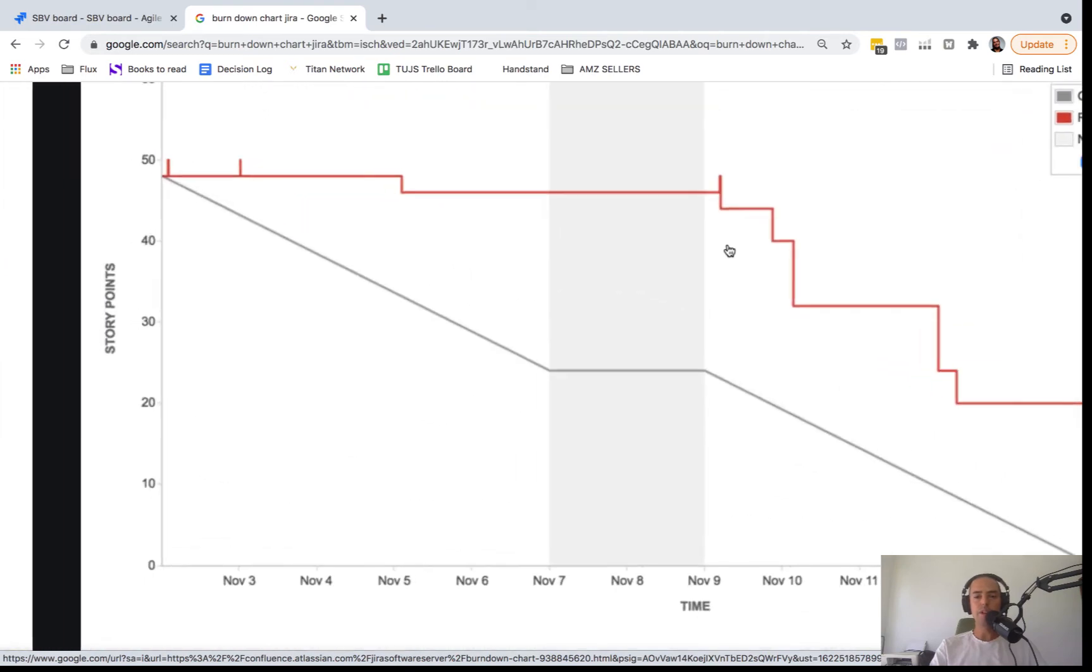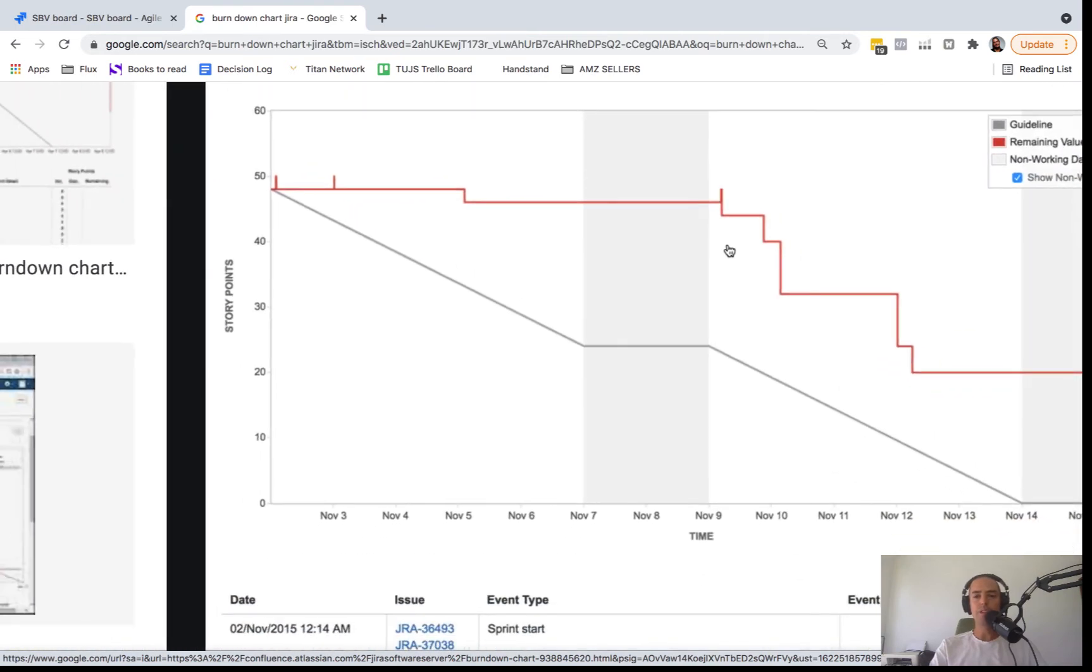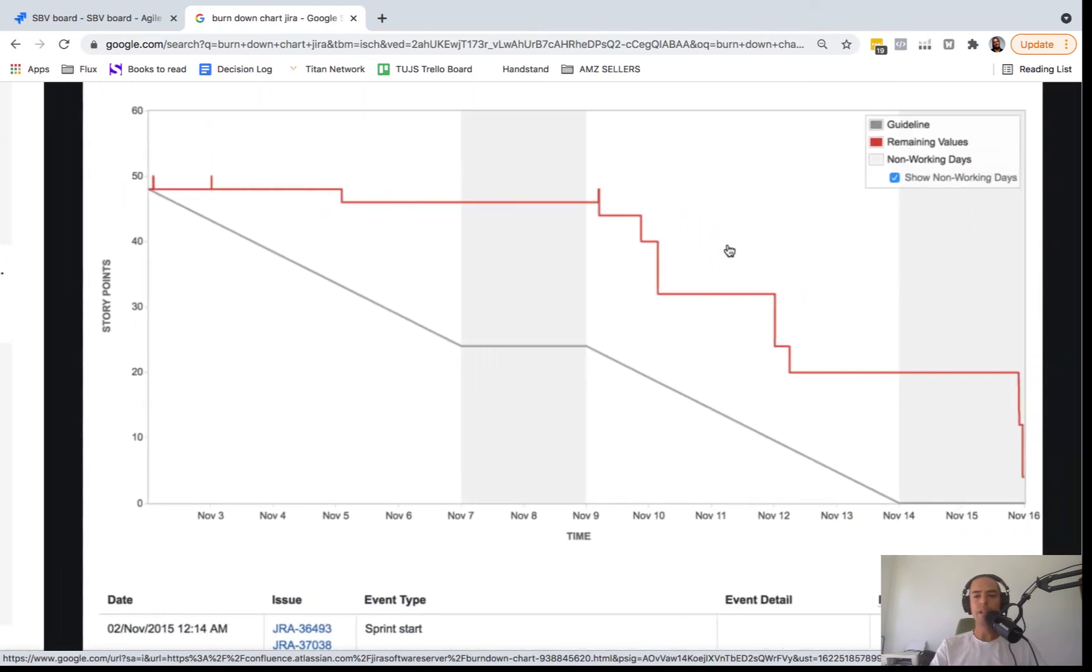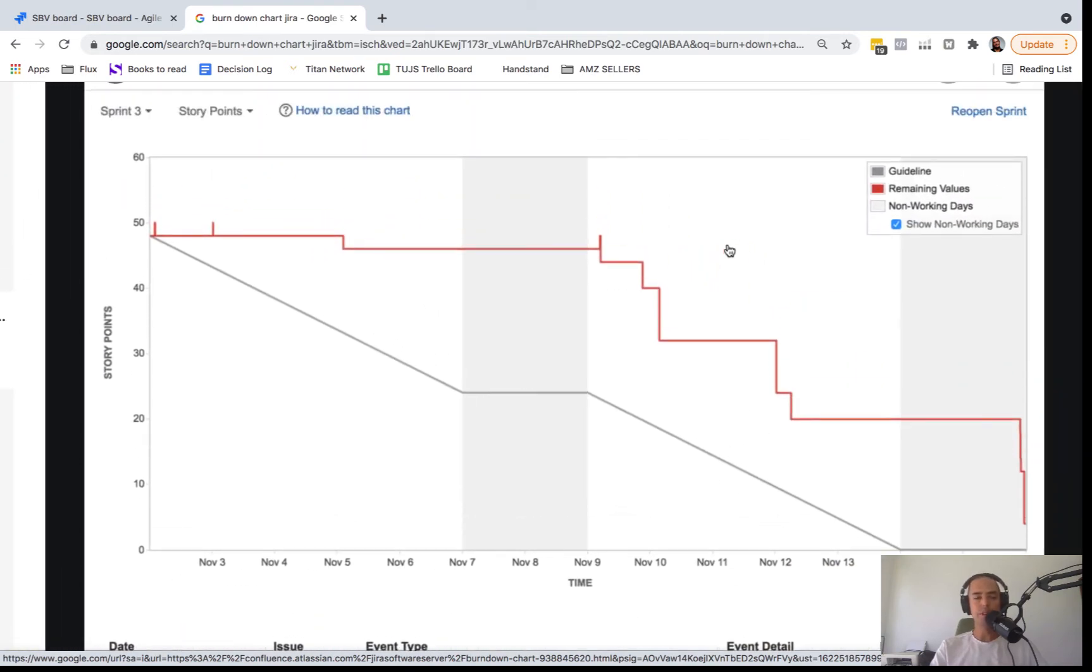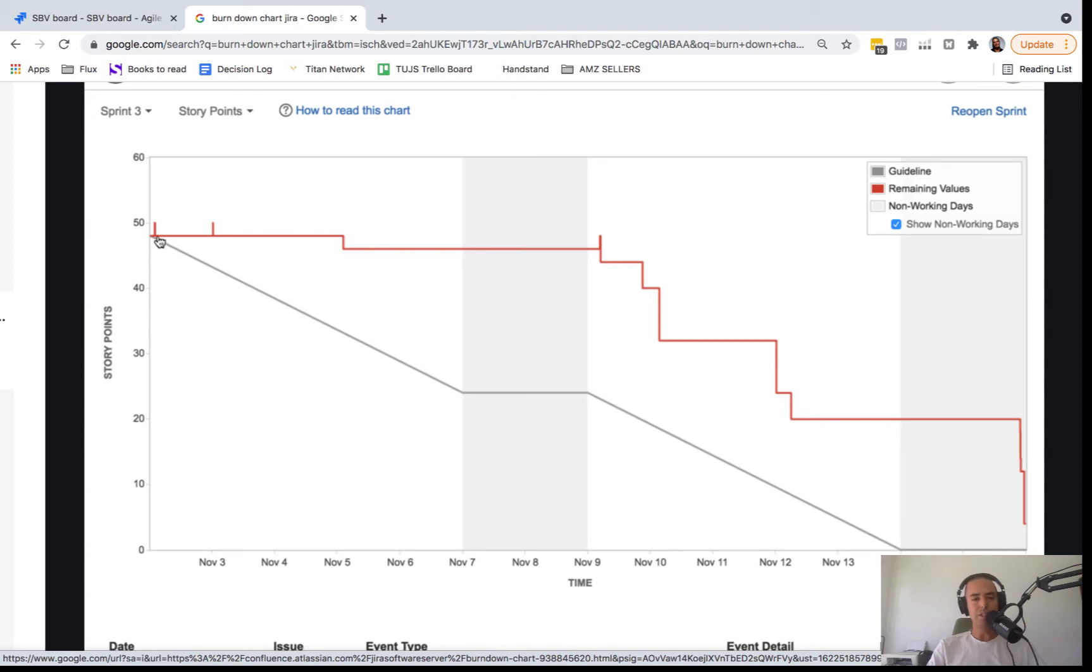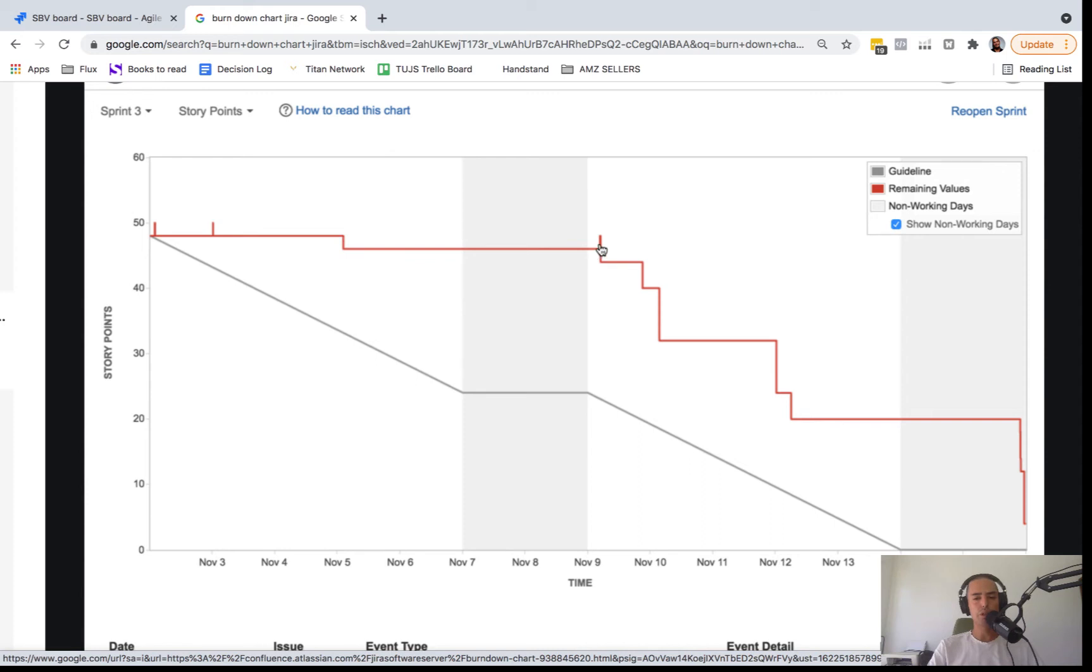So this will be a pretty normal chart. You start at... I just found it in Google because I don't have in my test ones a good example. But you start with 50 story points and then on November 2nd you've started your sprint. And then maybe you added something to a sprint, so maybe one point it goes up and then you complete it, it goes down. So up and down and then slowly but surely you burn down for them.